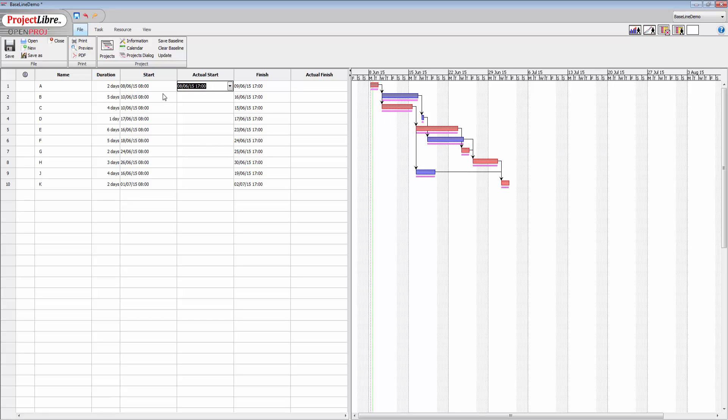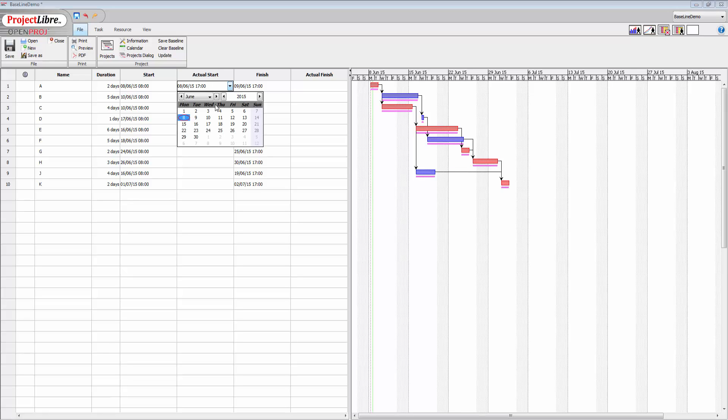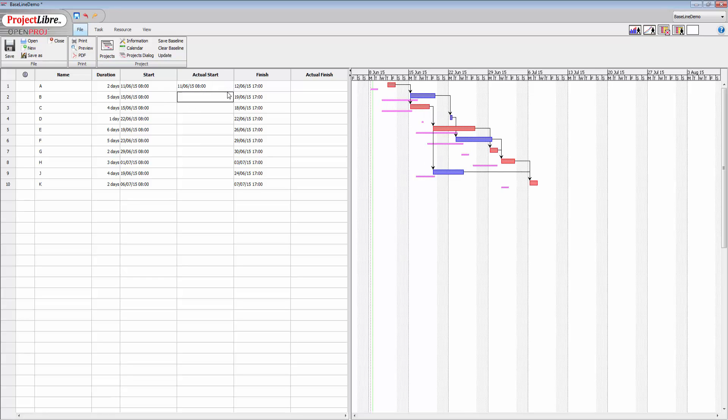So if for instance I change this from the 8th to let's just say the 10th, and click enter, there we go, you'll see there the entire project moved. All right.